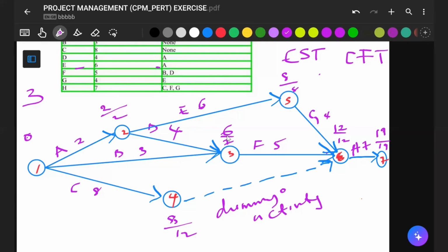We've gotten for this. We've gotten for this as well. What is left now is what will be here. Now, at this point, you have 2 minus 2, which gives you 0. But at the same time, this is connected to this. And here you have 7 minus 3, which gives you 4. Here you have 12. 12 minus 8 will also give you 4.